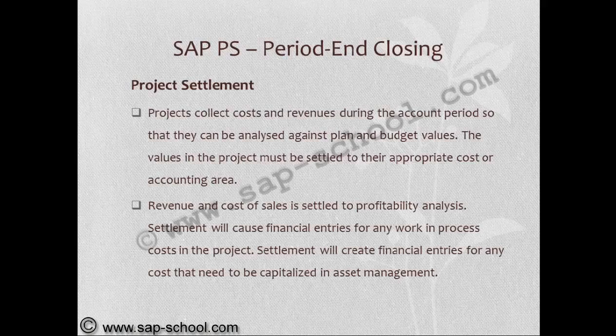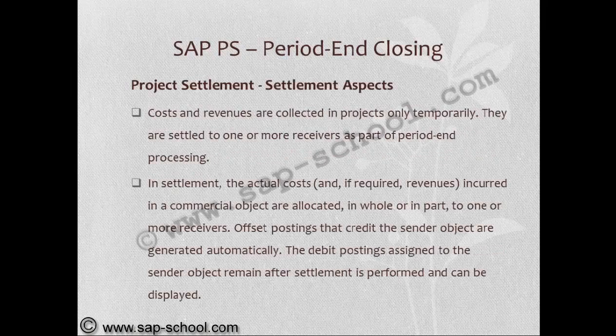Revenue and cost of sales is settled to profitability analysis. Settlement will cause financial entries for any work in process cost in the project. Settlement will create financial entries for any cost that needs to be capitalized in asset management.